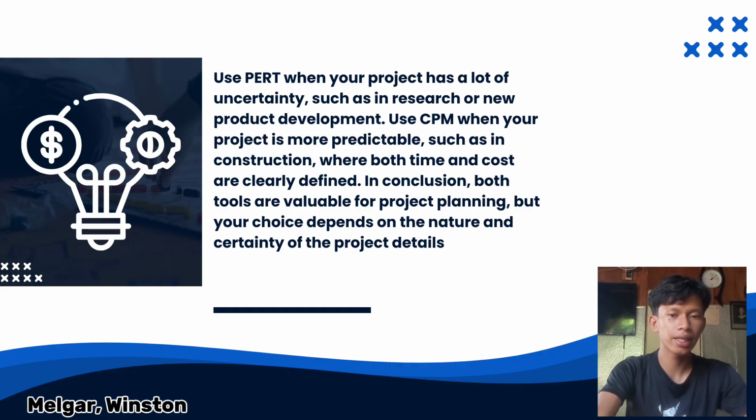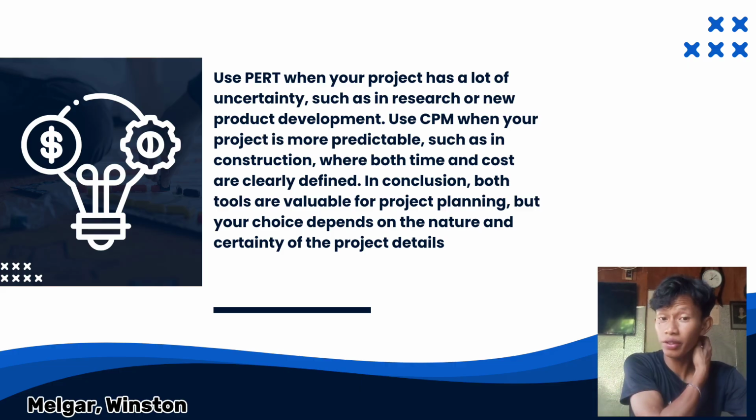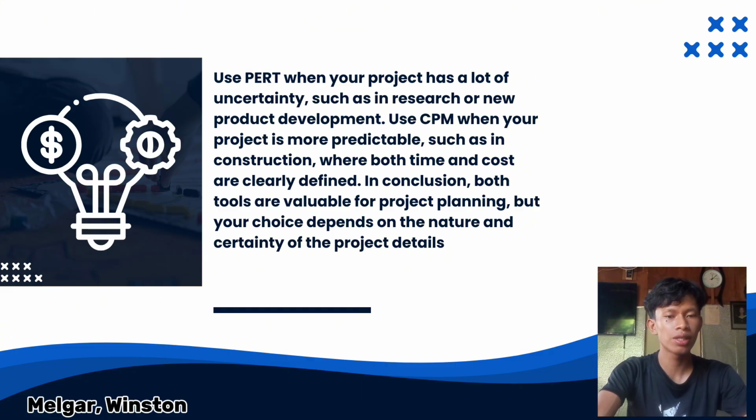Now, identify the critical path. The longest duration is the critical path, which is step 3, because any delay here delays the entire project. Now, our critical path here is A to B to D, with a project duration that equals 11 days. Now, the explanation here is that CPM helps us to find which sequence of tasks, the critical path, must be completed on time to avoid delaying the whole project. Tasks on this path have zero float, meaning they cannot be delayed.